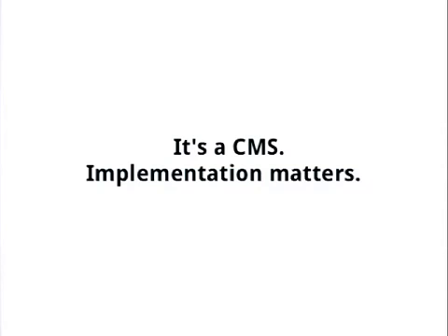So find out who's going to be performing this task. How often are they going to be doing it? You say, well, there's a really simple way we can do this, but it might take them a little longer to do it in the CMS. So is it worth spending a couple more hours of development to make this a simpler task?